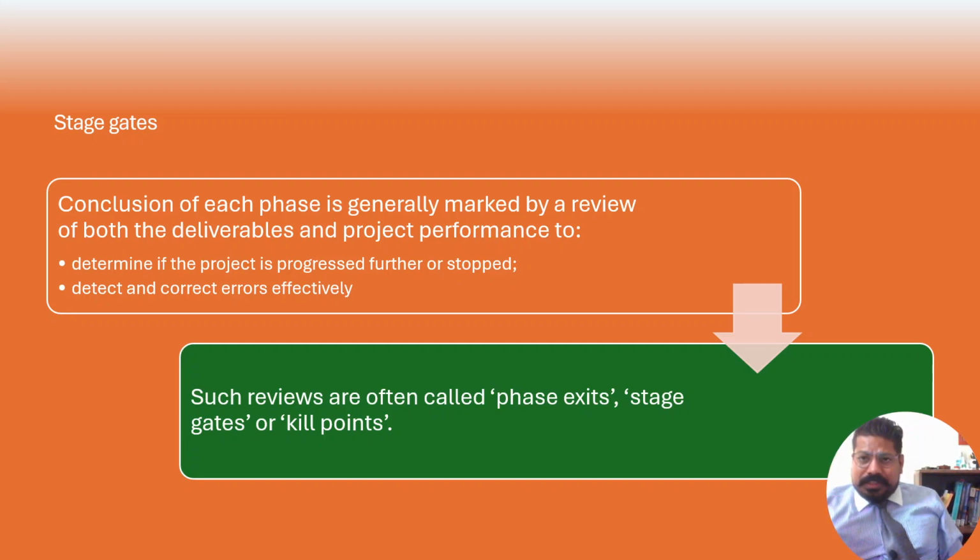If you realize that the intention, the goal that you have started with, is already met by some other product, or the market is not that big, or you will not be able to realize benefits, in that case either you reinvent your project with a change in the product deliverables, or completely stop the project, because you have already invested a lot and there is a lot more investment pending. So at least you can save what is left to invest. So this is an important concept.